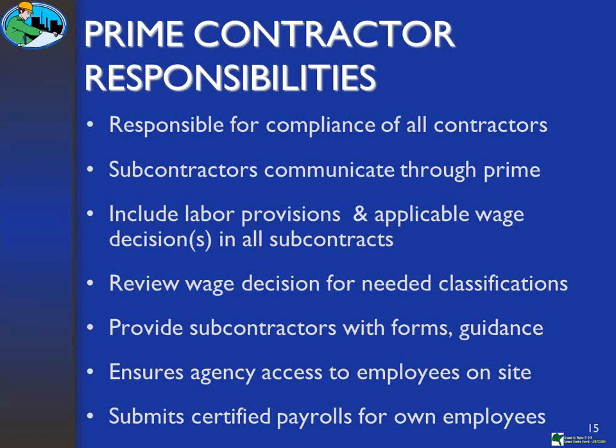We try to encourage the prime to provide us with a list up front. That prime can look at it, get a general idea of what wage classifications may be missing, and give you a comprehensive list that, first of all, has to be submitted to the Department of Labor for their approval, because what is happening is called a conformance.